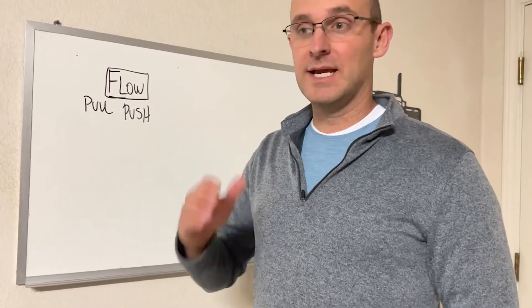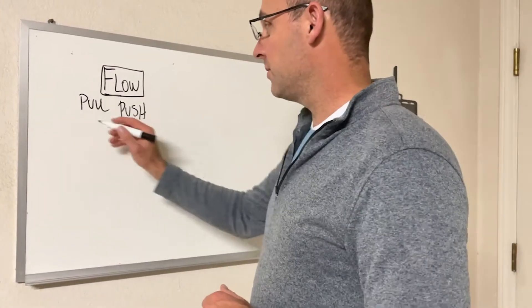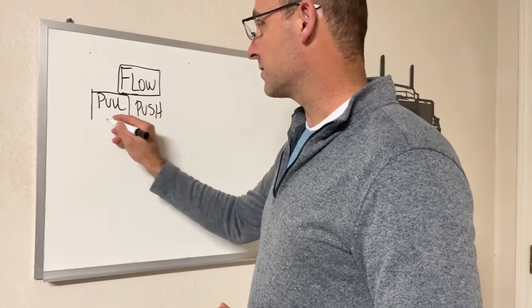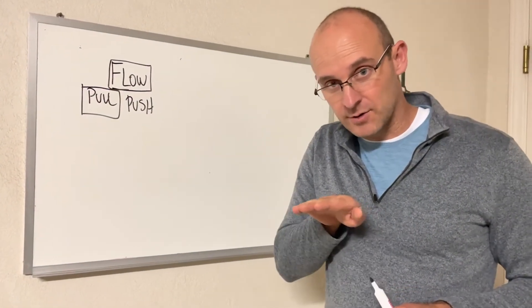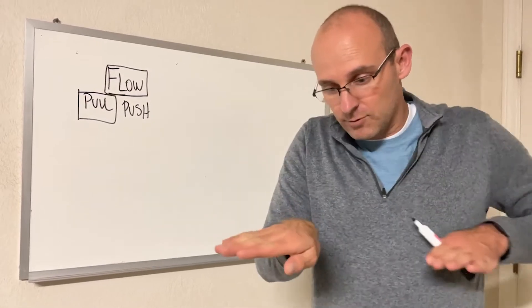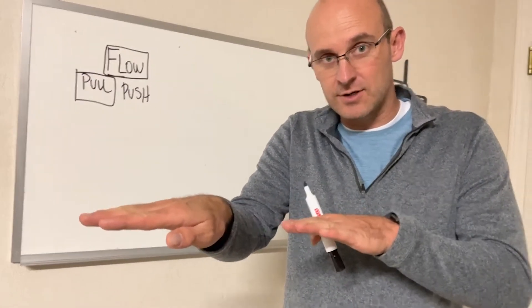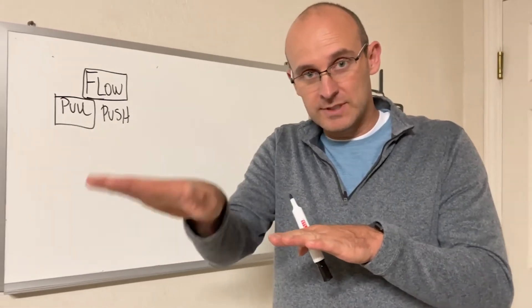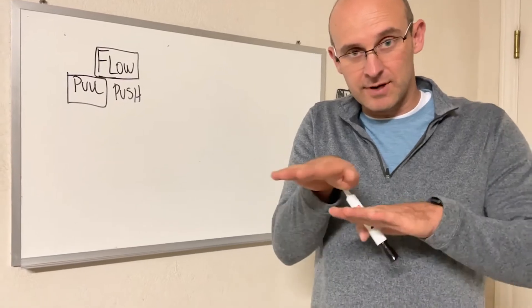Pull: that's where one contractor, whoever's going first, whatever pace they're going, whether slower or fast, will pull contractors behind them. And when this contractor starts is determined by when this contractor completes. That's pull, so that means they're not overlapping.